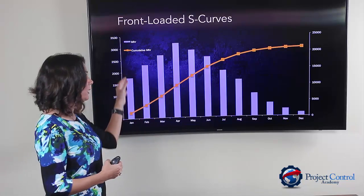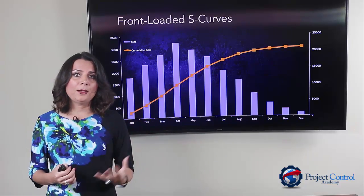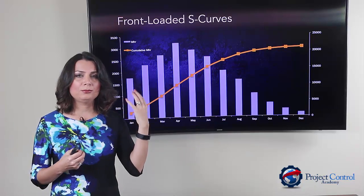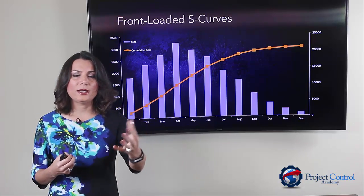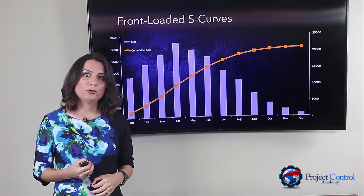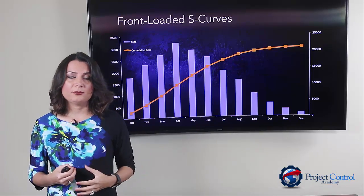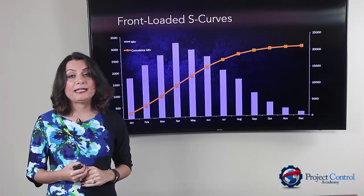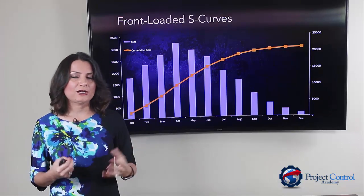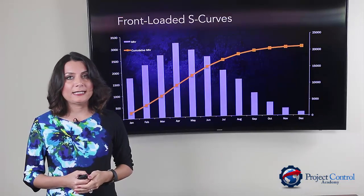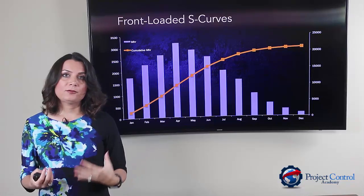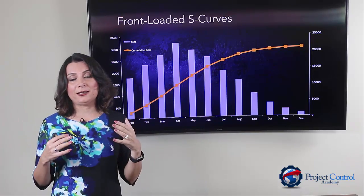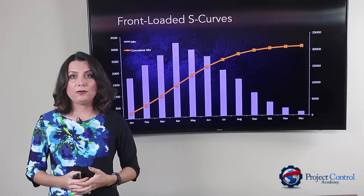If you are drawing cost information, mobilization costs or deposits that you put for some procurement items tend to create a front-loaded shape for your cash flow curve as well. These are some examples of projects where you may see a front-loaded S-curve forming.